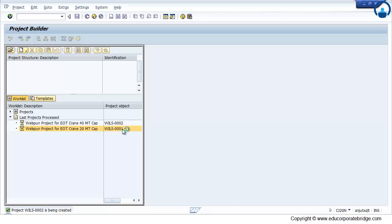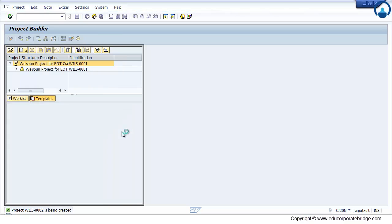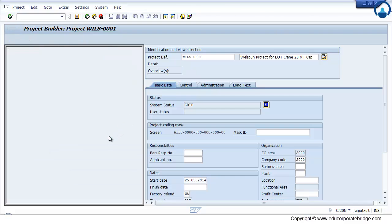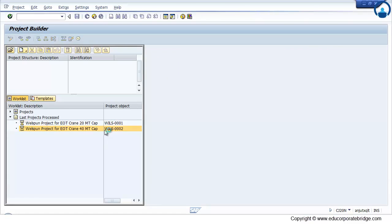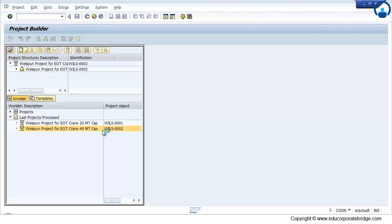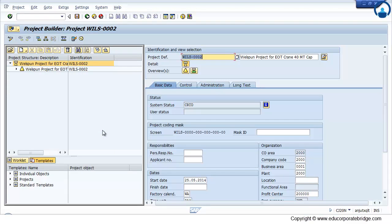And now this is the second project which I have created manually in the system. So this is called the operative project, which is later on used for creation of planning, budgeting, execution and closing.